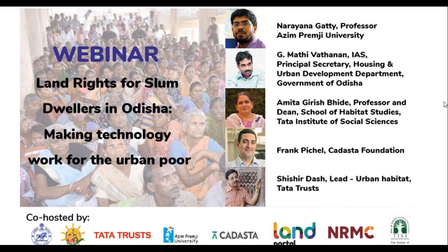About 27 civil society organizations were partnered for data collection at the field level and validation, and about 600 to 700 field facilitators were hired by the state government to collect the data from the field. Networking with knowledge partners from the private sector is crucial to the success of the project. The involvement of private technical agencies for slum mapping and GIS related activities has already brought innovative technique by combining high-tech drone survey with ground-level physical verification of slum settlements by the NGO and the members of Slum Dwellers Associations.